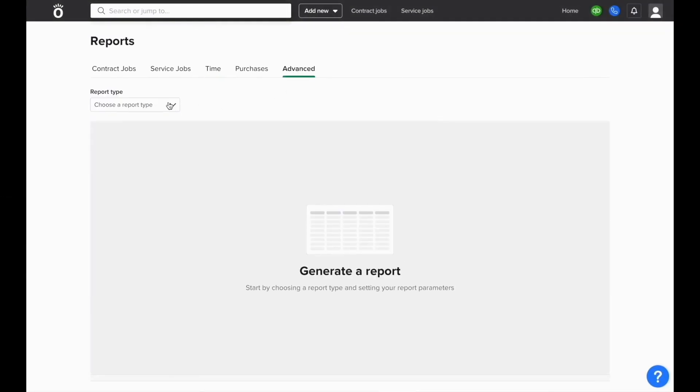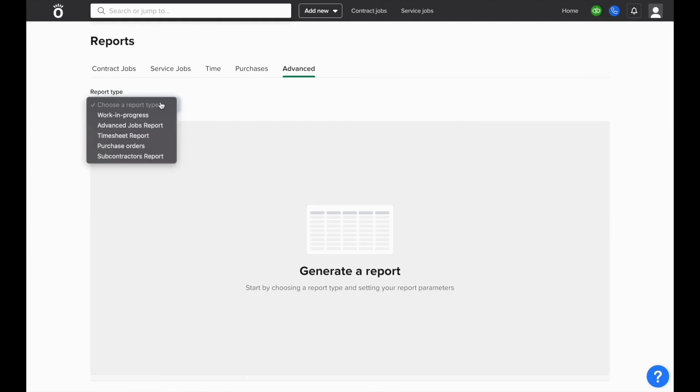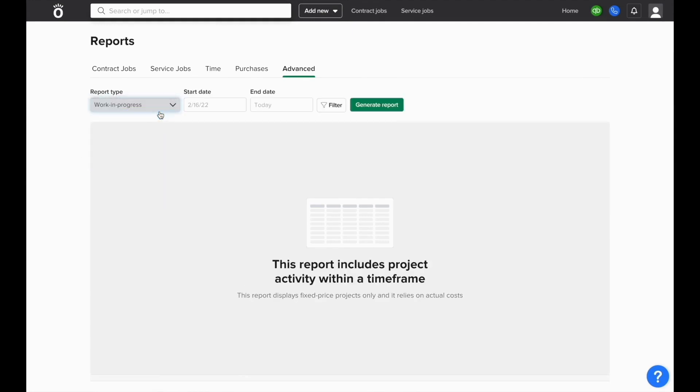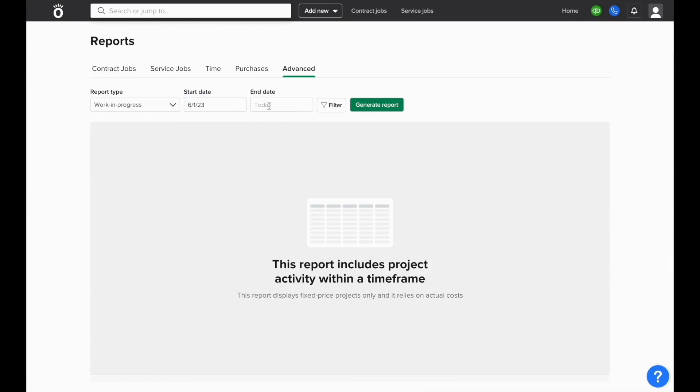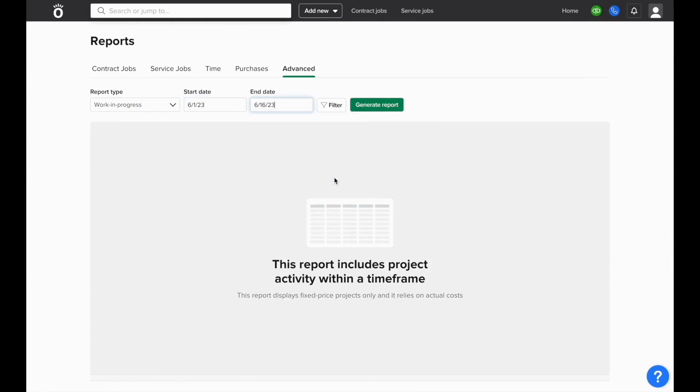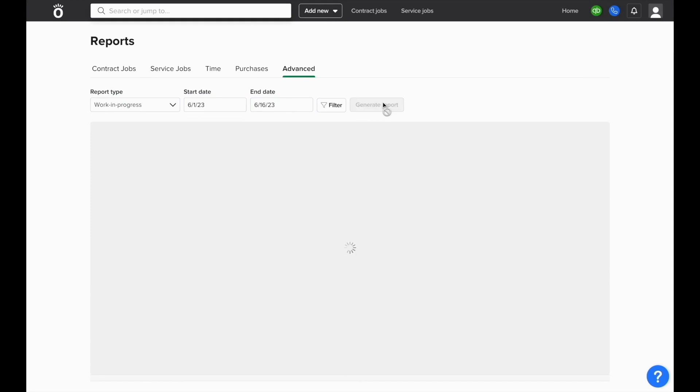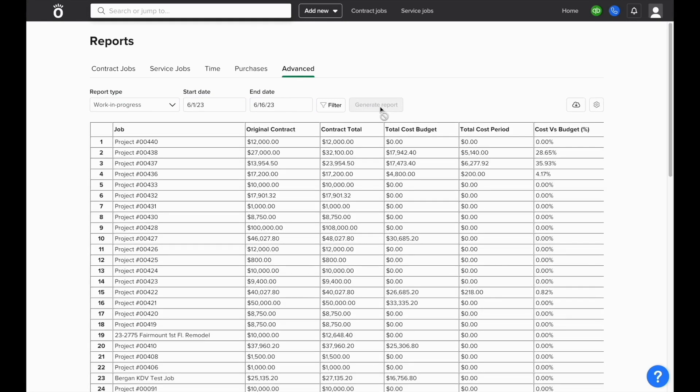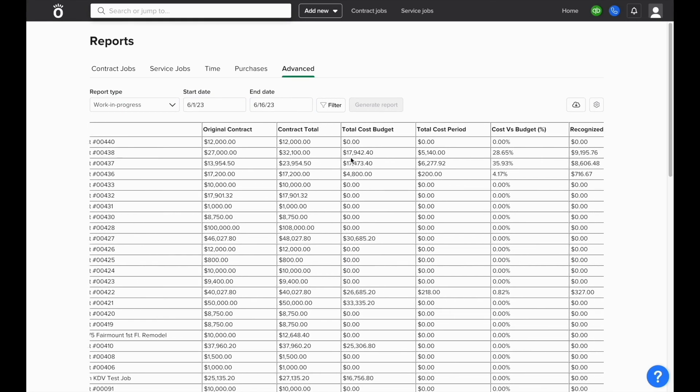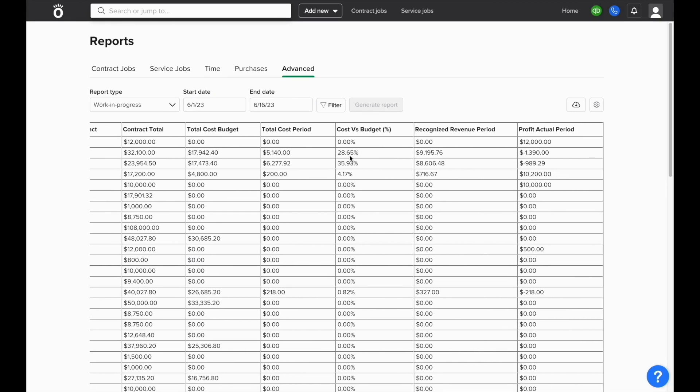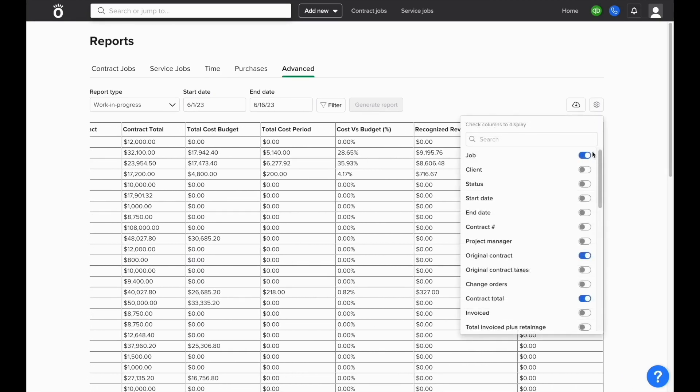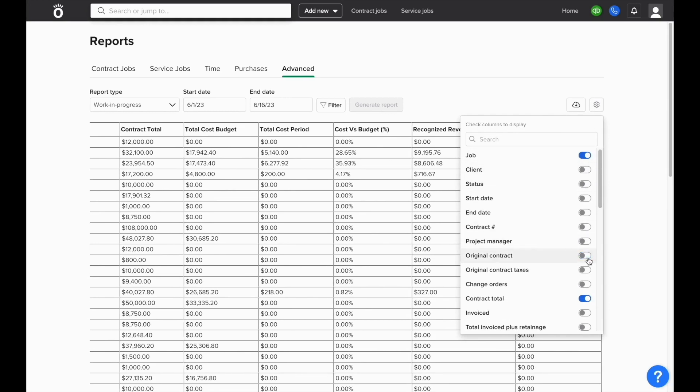And if you need time-based reporting, you can go to the advanced reports section and run the work in progress report, so you can select a start and end date and only see cost and revenue incurred across jobs in a specific time range. The work in progress report can also be customized so you can change which columns are available to make it have more or less information based off of what you need to see in this specific report.